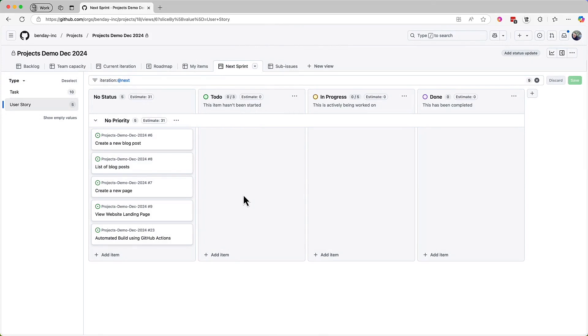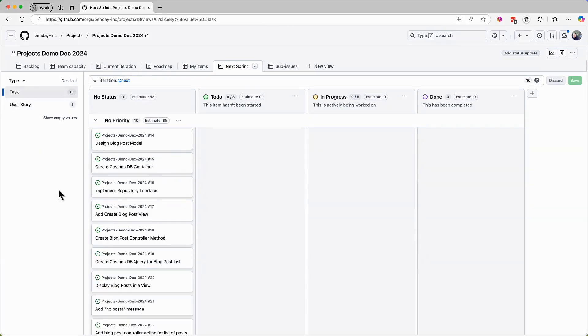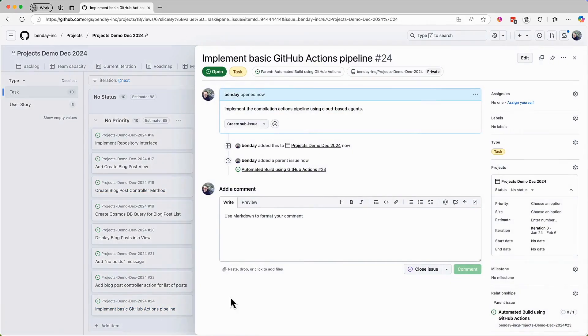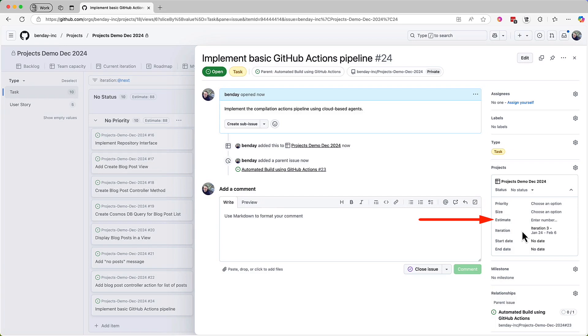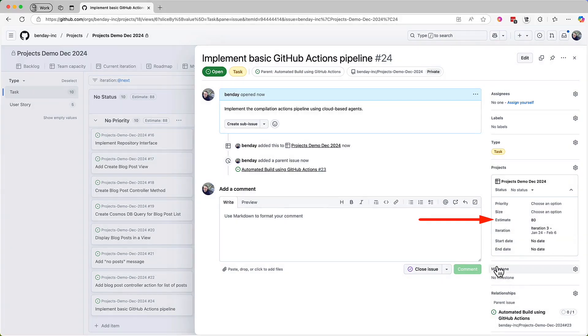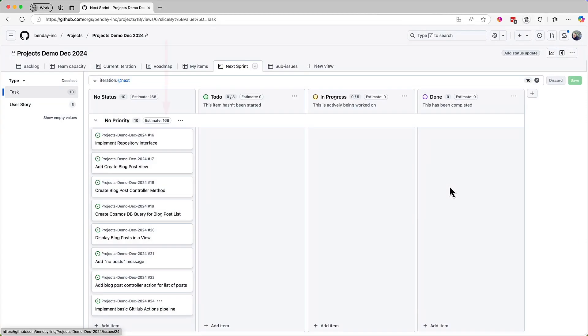But we haven't added an estimate for that work yet. Let's open up that task for implementing that GitHub Actions pipeline, and let's say that we discuss this as a team and decide that, for whatever reason, it's quite a bit of work, and we give it an estimate of 80 hours.